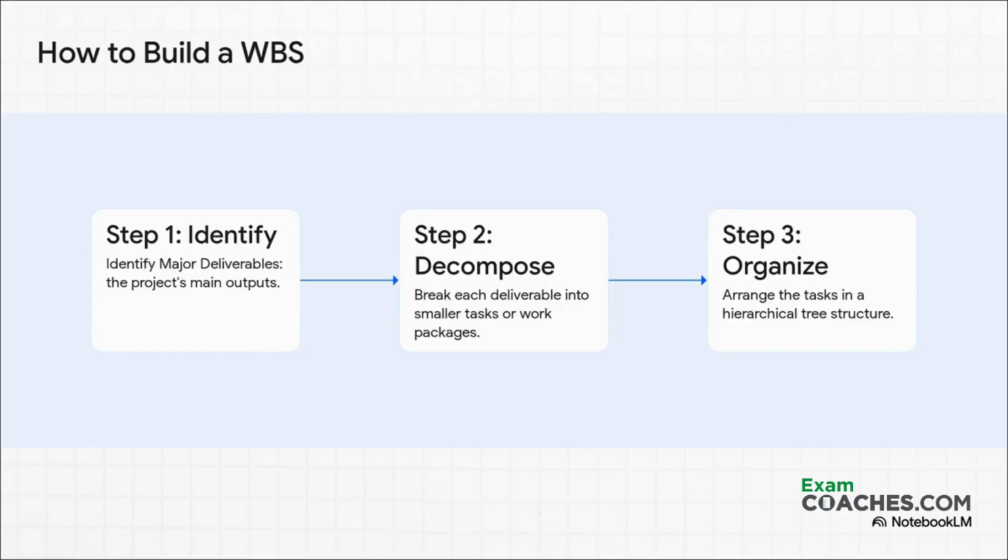At Exam Coaches, we show you how it's done. You start big, right? Identify your major deliverables. Then you break those down. You decompose them into smaller and smaller tasks. And finally, you organize it all into a neat tree structure. It's simple, it's clear, and it is so effective.